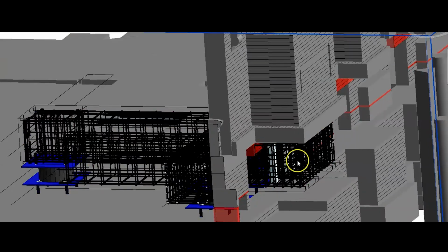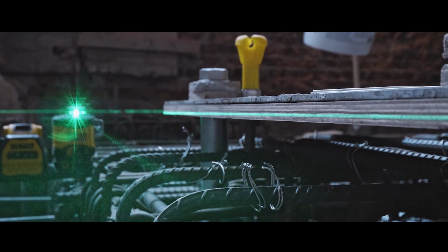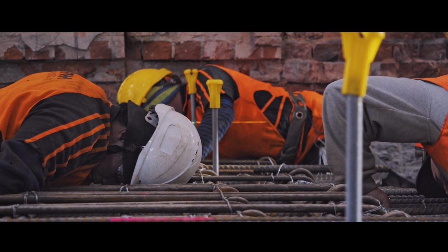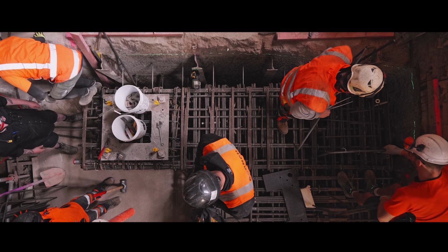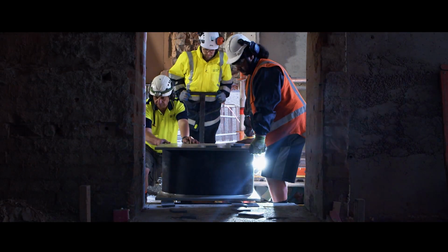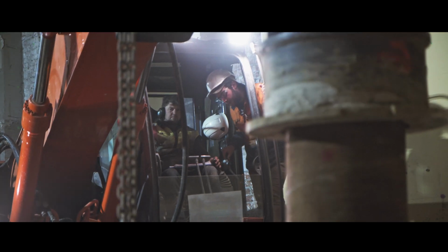We leverage the data that's been captured in the 3D models for our Naylor guys on site to help them plan the construction sequencing, mitigate the risks on site and the on-site issues 6 months, 12 months before they actually have to physically build it, as opposed to figuring out those issues on site. But it's also reducing our people's risk as well, which is quite cool.